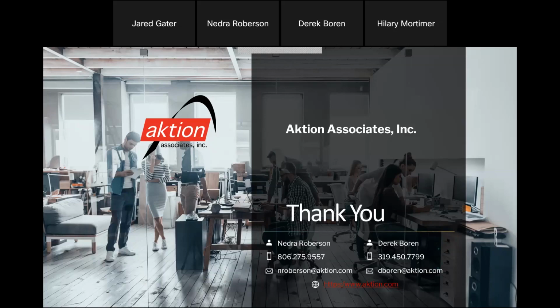So again, it's a really powerful tool to set those up across the board if you want to have different variations of billing terms inside of your project. You set it up at the top level, and then you go down into your lower levels and set what you're looking for inside of there. And there's a few little nuances as it goes through, and we can work through those independently with someone. But you tell it you're going to use sub-level terms at your top level, and then use the terms you're looking for at the lower levels.